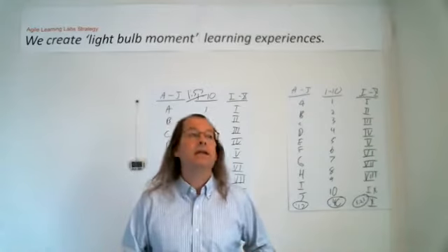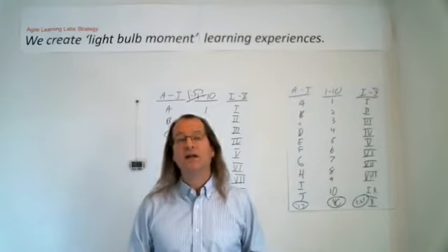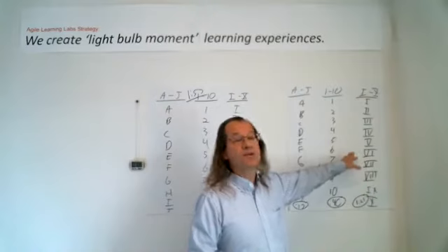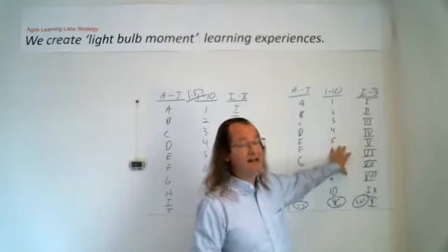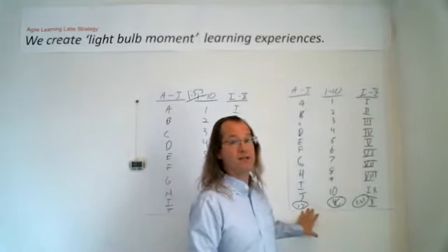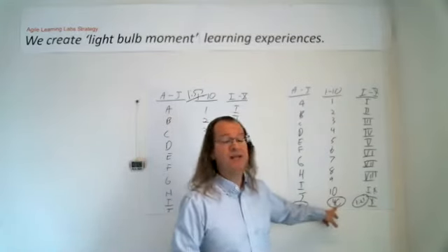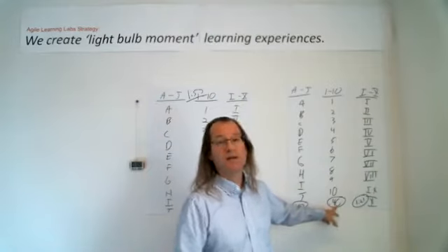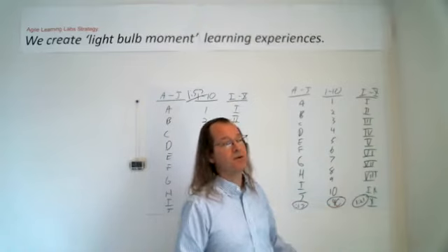And so, if I've got a team who is demonstrating every sprint they get this much stuff done, and I am the stakeholder for the numbers or even the Roman numerals, I may be willing to have the team not start on my thing yet, right? Let them get those darn letters knocked out because that's the most important stuff. Because I know ultimately I'm going to get my stuff when they say I'm going to get my stuff, because we know the team's velocity. Every week we see them delivering features. So we have much more meaningful feedback at the rate at which progress is going to go.